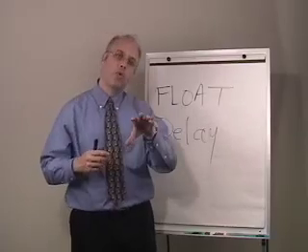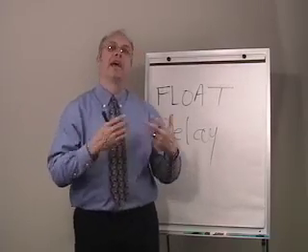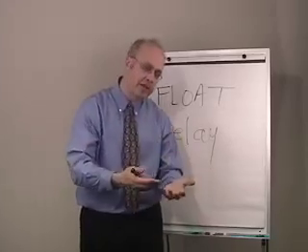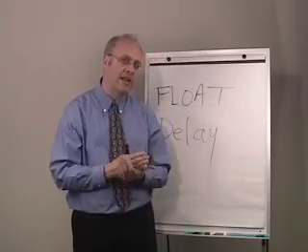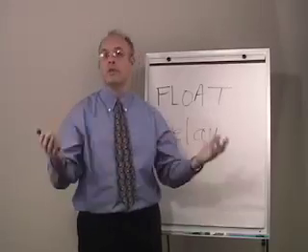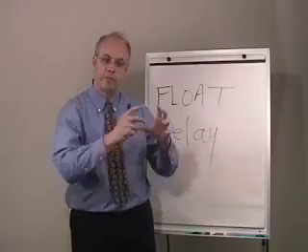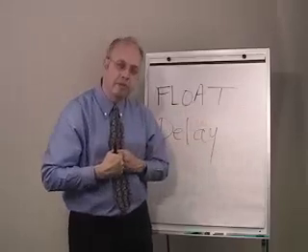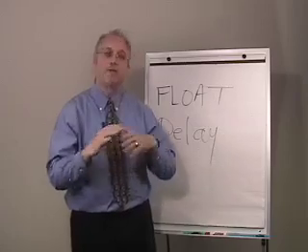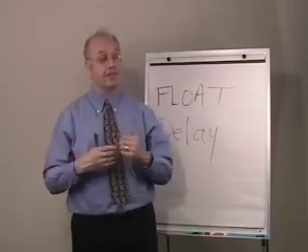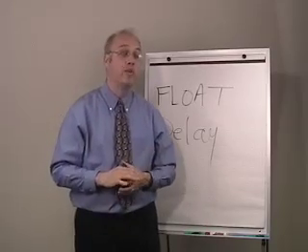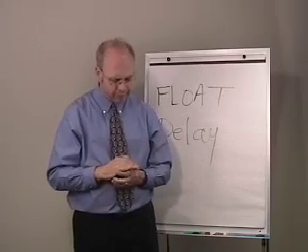So when we're evaluating whether or not an activity has been delayed, a delay to an activity is delaying the project, we have to evaluate whether or not the float associated with that activity has been consumed. It's no longer available. In other words, it's been used by one of the parties on the project until there is no more float, and any further delay is going to delay the project. Essentially, the critical path shifts to the work where the float has been consumed.